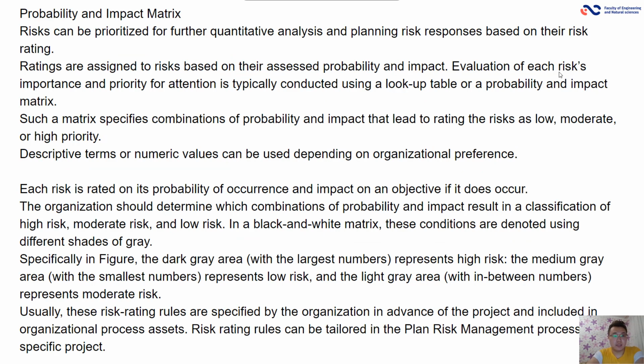Probability and impact matrix. Risk can be prioritized for future quantitative analysis and planning risk response based on their risk rating. Ratings are assigned to the risk based on their assessed probability and impact. Evaluation of each risk's importance and priority for attention is typically conducted using a lookup table or probability and impact matrix.